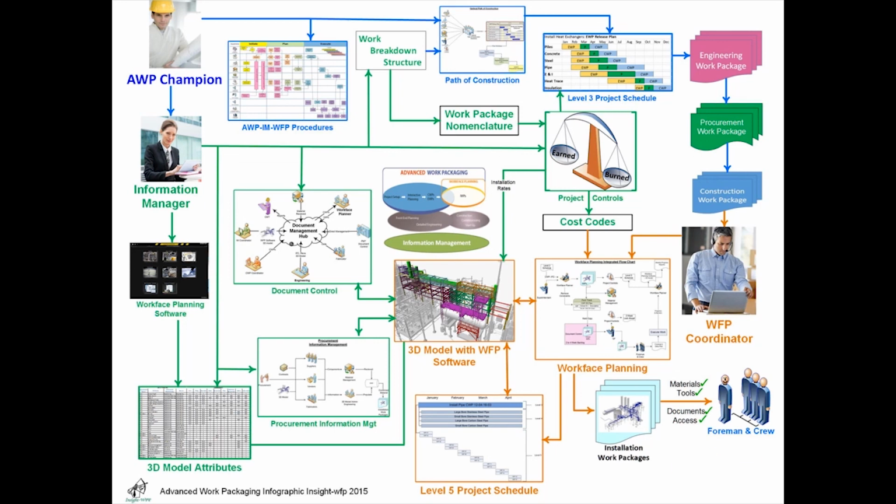Along with tracking of delays and earned value management, we also conduct tool time surveys as a means to monitor productivity. These field surveys capture statistical activity levels of the craft workforce that allow us to plot monthly trends and compare results against industry averages. The tool time studies also record specific events and field level processes that highlight productivity issues outside workforce planning. The management of these opportunities leads to continuous incremental improvements.